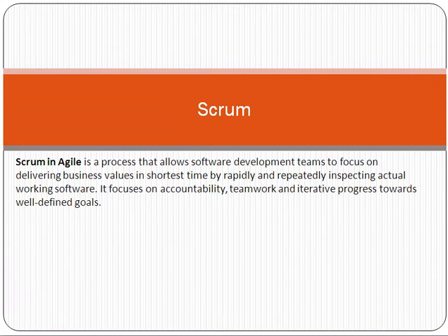Sprint 3 again, plan, develop, test, and deploy. Sprint 4, plan, develop, test, and deploy. So by the time we reach sprint 4, all the tasks contained in the 40 tasks of the e-commerce solution will be developed, tested, and deployed at the customer. So this is the approach of Scrum. Scrum means that, friend, we divide the work into chunks. Chunks means the sprint. A sprint is a time box of 3 to 4 weeks.